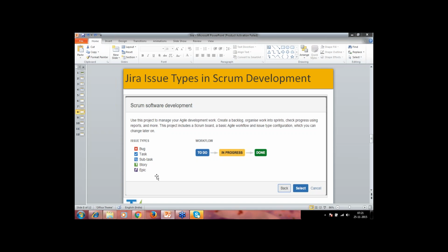But since we cannot avoid review, in my case, as I already told you, I'm working as Scrum Master in a team. I strongly recommend the review for anything. So what I do, I will create a separate task for review itself. If some X person has to review Y person's task, I will propose to create a task and assign it to the next person. The next person will actually take up the task, review it, and then put it in done when he completes the review.